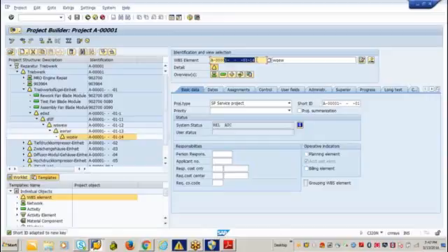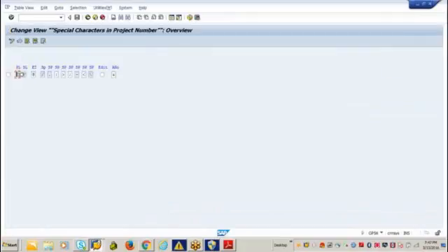in the coding. Suppose some company's current project has only 2 levels of WBS. In that case, the WBS length won't consume the majority of the project definition length, right? So the project length can be 5 as well, because the number of levels of WBS is less.